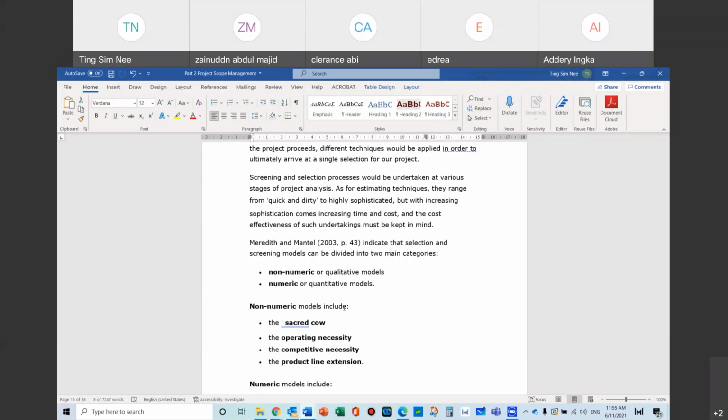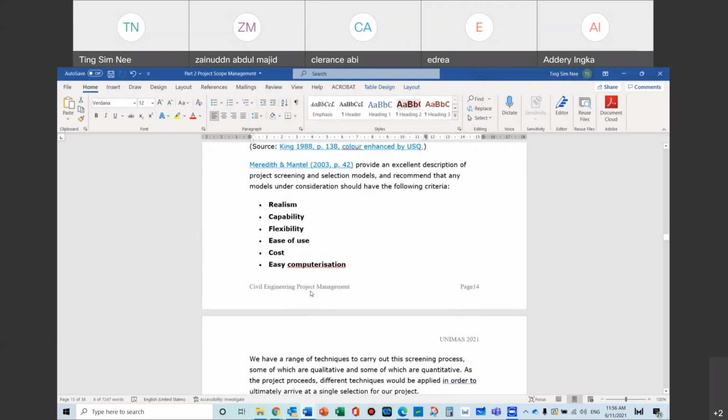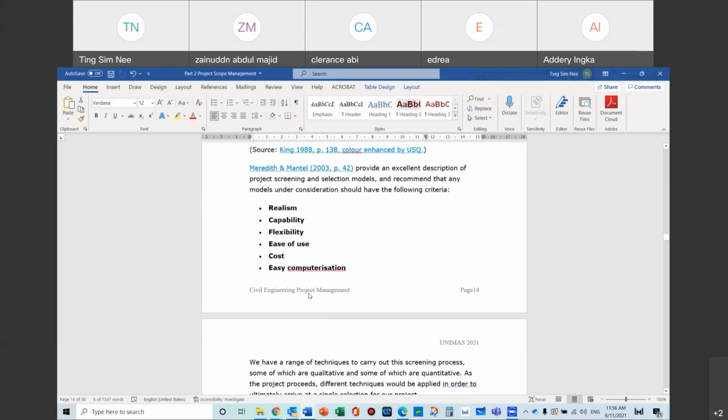You see, the first bit here that we spoke about earlier is about the scope to go ahead or not. Once you've done the initial environmental EIA and also the issue analysis, once you reach the project charter, it means that the project charter will tell you the scope is going ahead. So the project charter, your management will review it, and it is a go ahead. Then you go and develop the scope statement, and the scope statement will have different components of the project. It will be more about what the project is going to be like, and you'll be doing some initial testing and all that. So you come up with a scope statement, and that scope statement is the one that you'll be doing your feasibility studies and your viability studies on.